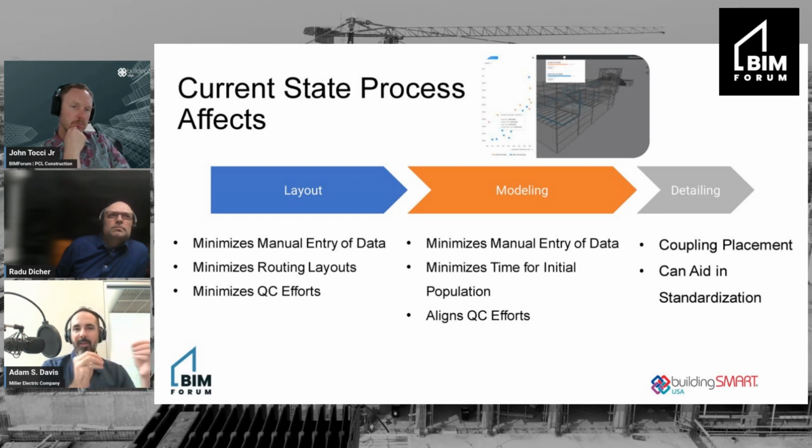How do you want to look at that? Is it a happy medium? Do you have a lot of available labor in a certain location that you're working, or do you have not available labor? And it'll run solutions based on those. And again, it's based on NECA units and labor units. And that's kind of the next evolution of what's going to come. So that's what that little slide represents up there.